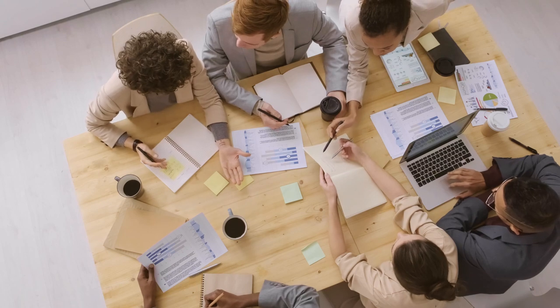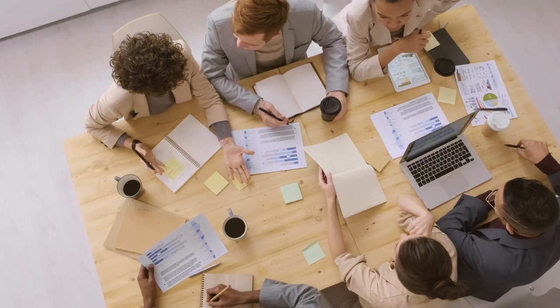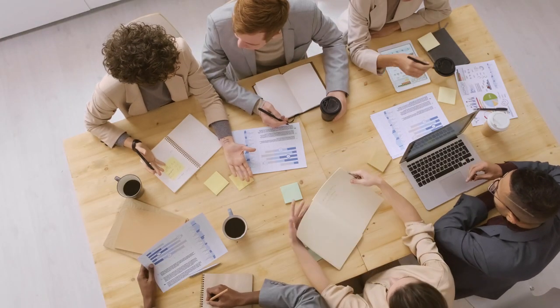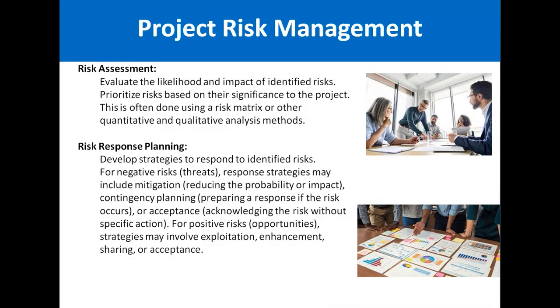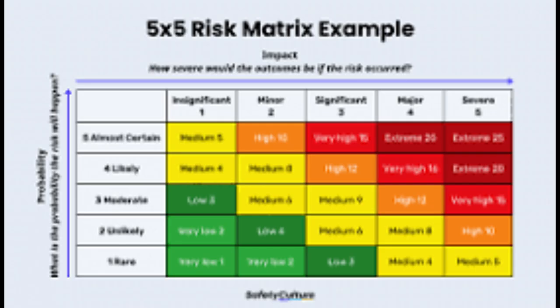Then risk assessment is very important. A risk assessment means that you identify the likelihood and the impact. Likelihood means probability, that is, how many chances are there that the risk will occur, and impact means major impact, minor impact, or medium level impact. Based on that we prioritize the risk and its significance to the project. This is often done using a risk matrix or other quantitative or qualitative analysis methods.